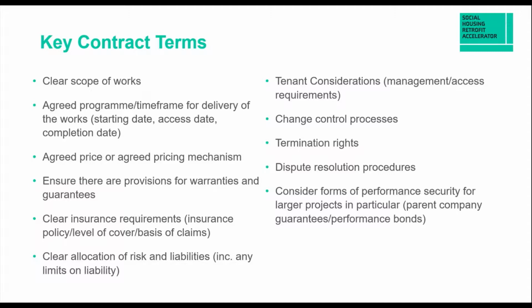Secondly then, an agreed programme and time frame for delivery. You can see there, it's really important to agree, what is the starting date? What are the access dates, particularly in relation to tenants and working in their houses? Are there any restrictions on that? When can the contractor have access? And then importantly, the completion date. So when is the contractor committing to have delivered everything that he needs to do?